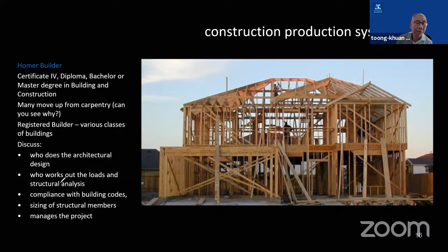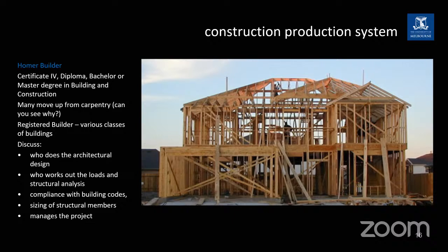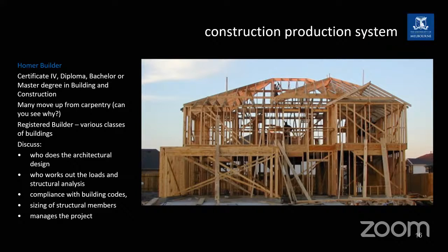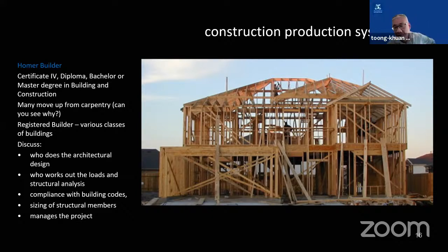Okay. Now, how about the compliance with building codes? Who ensures that the builder complies with the building code? Okay, so there is another profession called building surveyor, and the builder has to engage an independent building surveyor to check that the building complies with building codes. Okay. So it's included in their proposed budget to the owner? Yes. So the builder will price everything, including the cost of compliance.